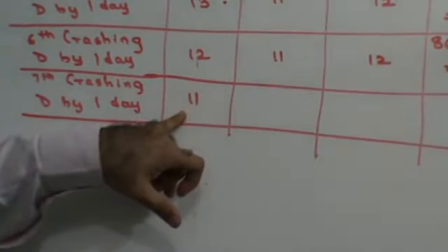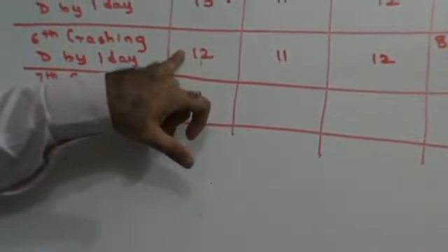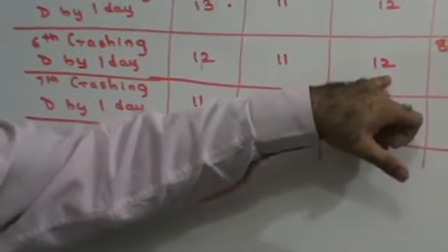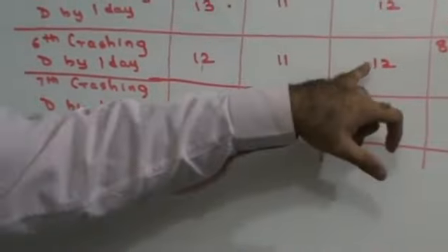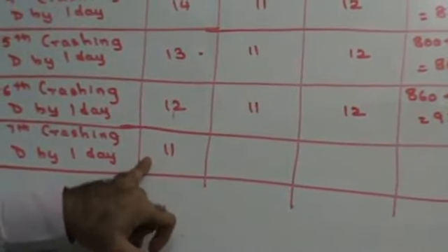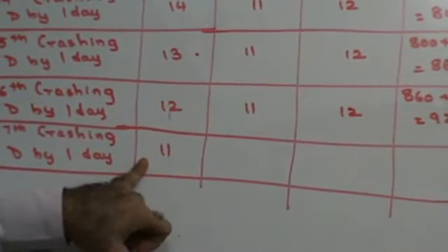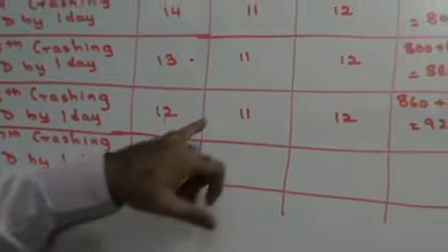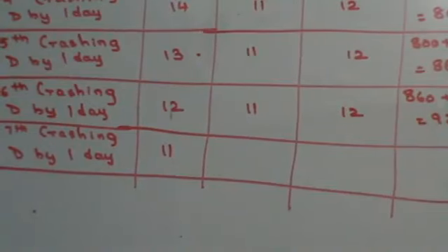The time of the critical path should be maximum. If I crash till here, the time of the critical path and the other path, that is your B, E, F, was the same. But now if I crash my critical path by 1 more day, then the time of my critical path becomes less than that of the other 2 paths.